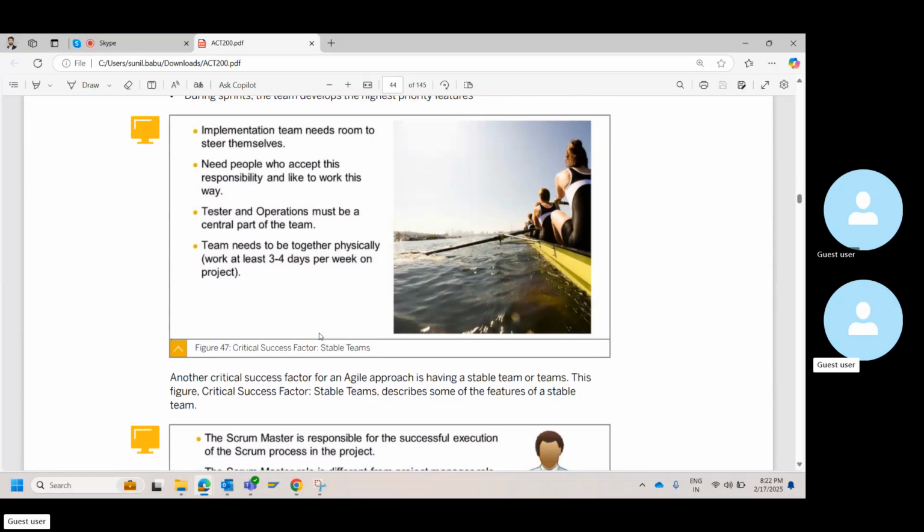If there is some guy, because of whatever reasons, if your company says, okay, I'll give you some guy, he's available until you explore, he will take all the requirements, he'll do the documentation, you can do the configuration with someone else. That will not work out. Or else, how you can tackle, if that is the actual scenario, is you will have someone in mind who will work for you for the configuration, right? That person should also be part of the explore during the workshops at least, so that he will get a hold of what is the requirements exactly and what discussions are being taken with the customer by the senior guy. Okay. So by this, you can at least arrest few gaps.